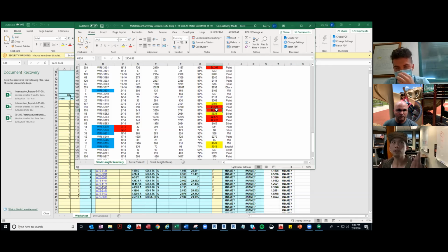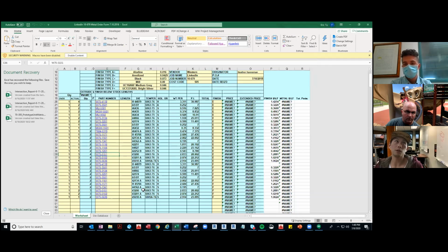And sometimes you might spend too long, and then you might not get the cost down that much. Like this one's 87%. I'm sure they probably beat it down to get to that point. So it's probably not worth it to continue on. So this is kind of like your yield, to show you how much waste. And then from here, it also generates the metal order, which goes to Heather on purchasing. So the PM goes to purchasing, and then they can purchase the material.